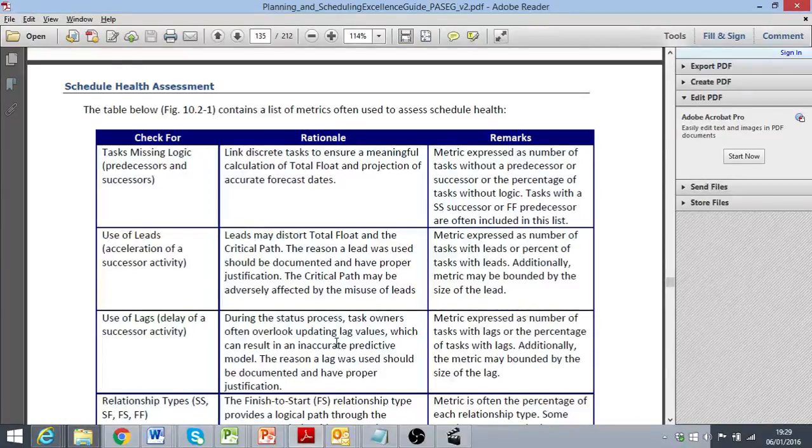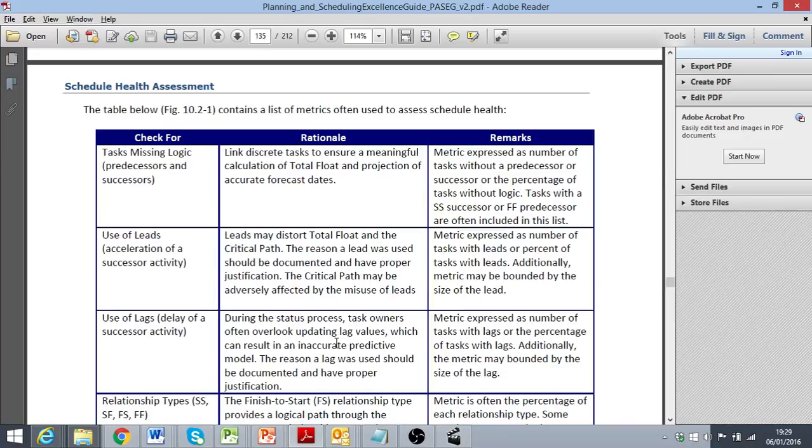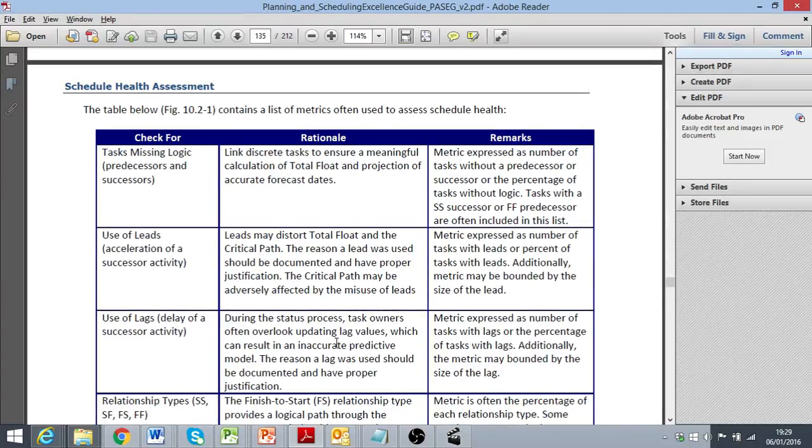The rationale for reviewing the leads and lags is to ensure that through their use or overuse, the project schedule timeline is not being artificially extended or shortened.